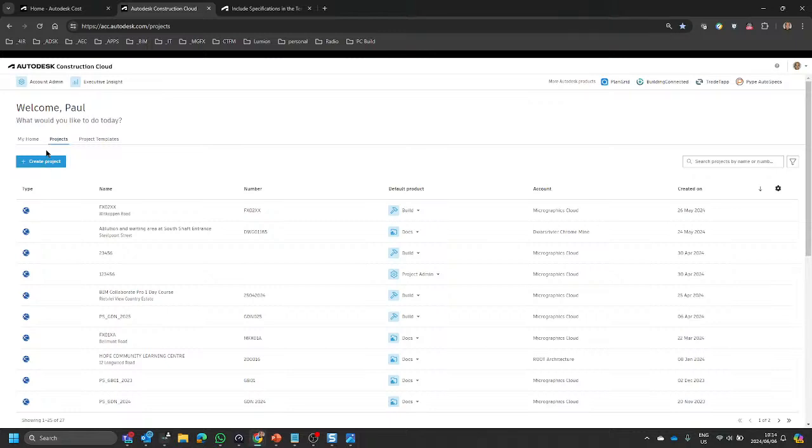So if you have users that you're managing as the account admin and you want them to be able to create their own projects, but you don't want them to be account admin, you can assign them admin rights, maybe have them in your office to make sure that they don't do anything that they shouldn't. Assign them admin rights, then revoke the admin rights. And then they'll be able to create the projects after they've initially created a project with you in the office with them, or however you want to manage that, maybe remotely, you trust them. Then you can say, all right, you can still create projects, it's just that you're not account admin anymore.